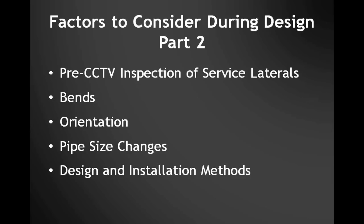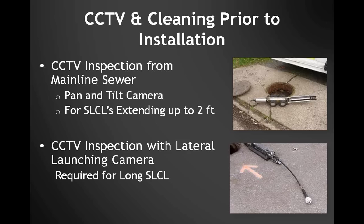Additional factors to consider during design include the TV inspection extent, whether there are bends, the orientation of the lateral at the main, pipe size changes within the service lateral, and the design and installation methods. All services must be televised so you can see what you're going to line into. If you've recommended a liner extending just a foot or two, a simple pan and tilt camera suffices, but if extending further — say ten feet or to the property line — you need a lateral launching camera. Not all service lateral liners can navigate bends, and attempting installation where bends exist can result in wrinkles or blockages. Understanding the geometry of your system is an important thing to note.